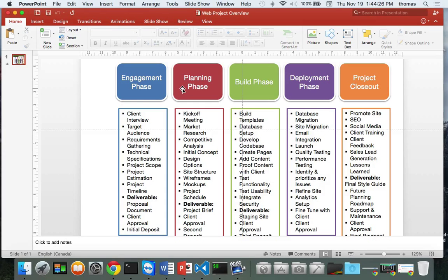We're not going to say no to a project. I'm not going to say, no, I can't do that stuff, I don't write content, I don't take pictures. No. I'll accept the work. I'll find someone to do it for me, right? But it's another piece. It's not included in my phase. It's out of scope for this project, right? It's a separate project that we're depending on, a dependency.